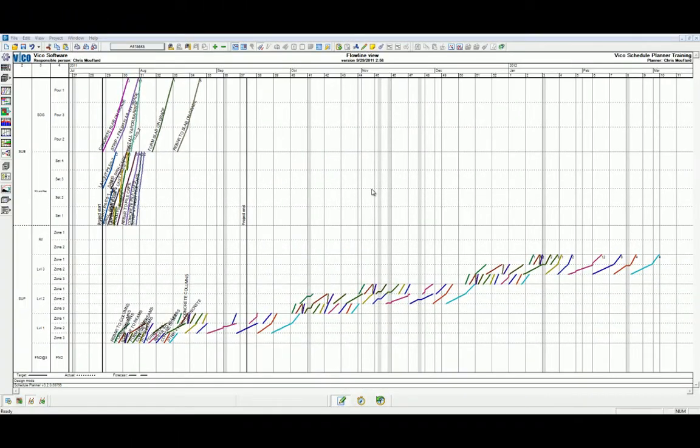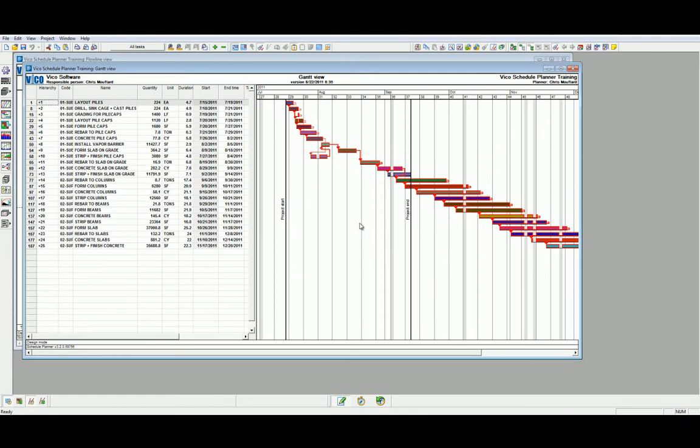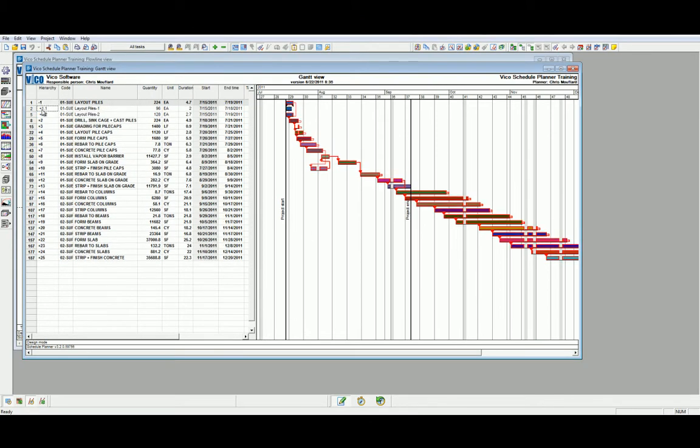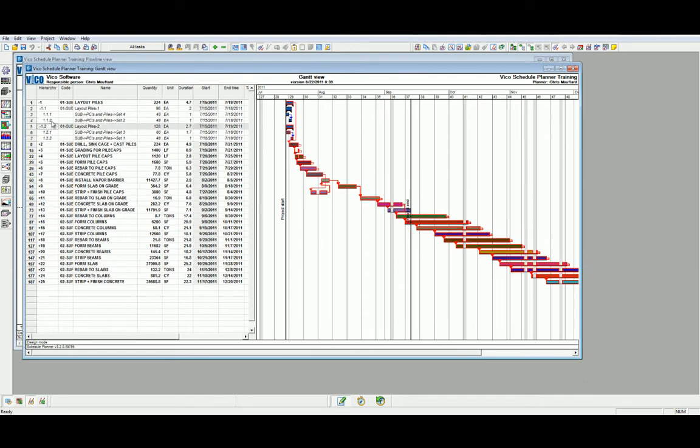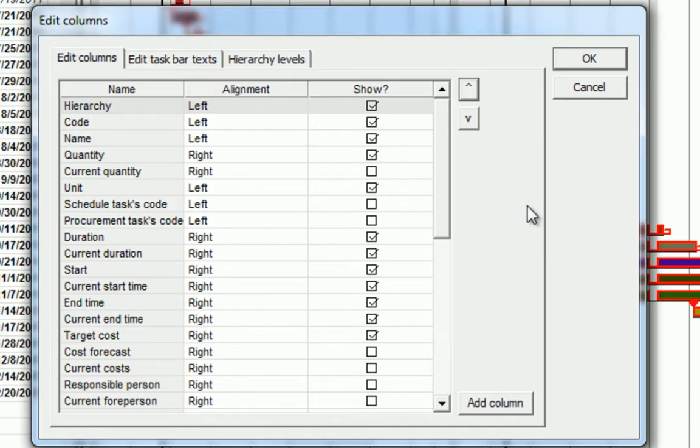Let's start by navigating to the Gantt Chart View in our side navigation bar. For the sake of the exercise, let's break down the Layout Piles task into its task parts and subsequent activities. One of the quickest ways we can start filtering the Gantt Chart View is by right-clicking and selecting Edit Columns.